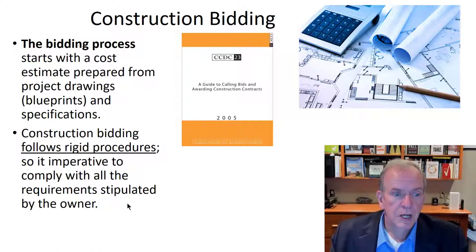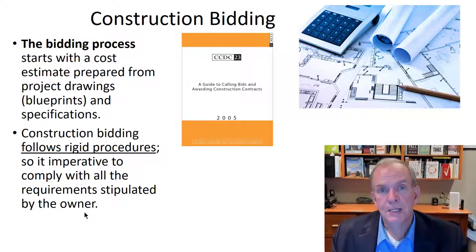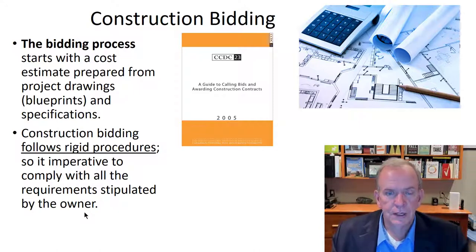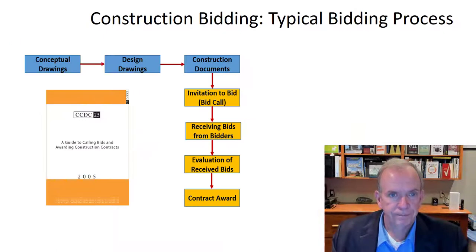The process follows rigid procedures and you have to comply with the requirements stipulated by the owner. If the owner says something in the bid documents, you better comply — because that's a reason they don't have to accept your bid. For example, if you're supposed to put in a clearance certificate from WSIB and you forget, that's enough for them to not accept the bid. These things occur all the time.